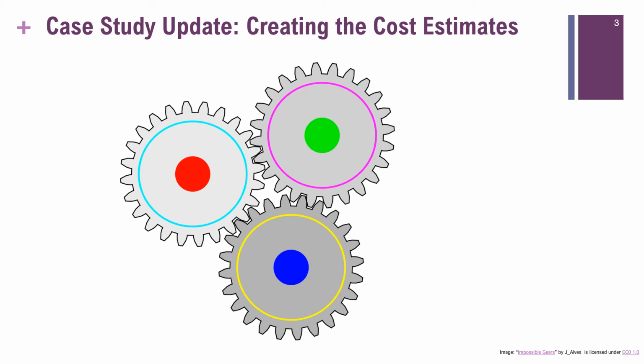Sophie also includes the cost of her own time and that of Jason, the business analyst, which she predicts will be spent during the executing phase. During the 5 weeks of execution, she estimates that about 1/3 of her time will be needed to manage the team, resolve issues, and communicate with the project stakeholders. She also estimates that she will need about 1 day per week of Jason's time to answer the project team's questions about the project scope and provide quality control for the completed deliverables.